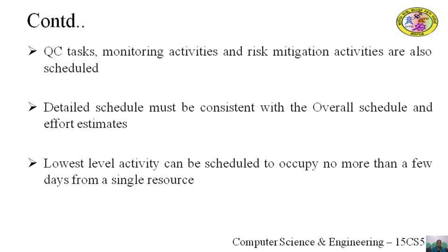Generally, the project manager refines the task to a level so that the lowest level activity can be scheduled to occupy no more than a few days from a single resource. Activities like project management, coordination, database management, and configuration management may also be listed in the schedule, even though they are ongoing tasks rather than schedulable activities. They are often included in the project schedule as they consume resources.